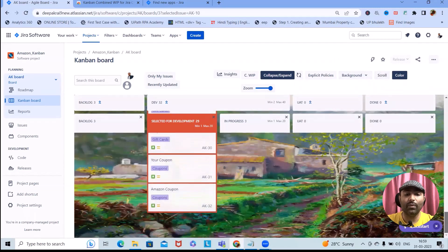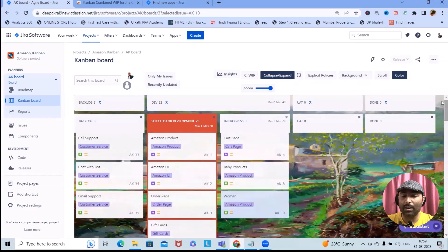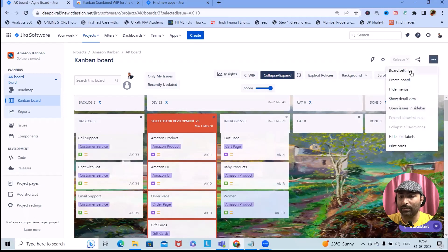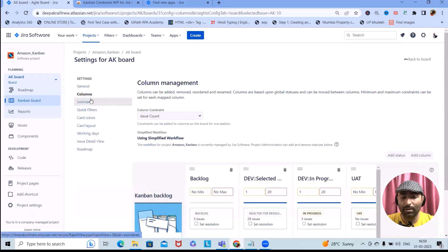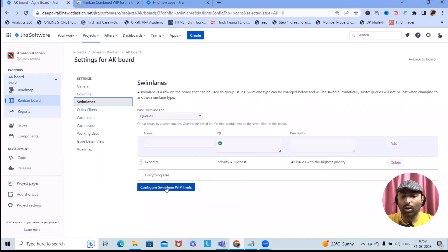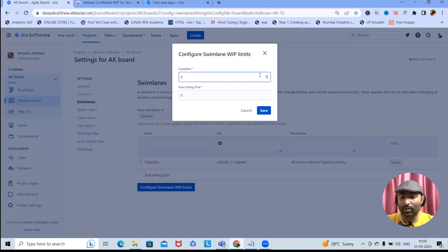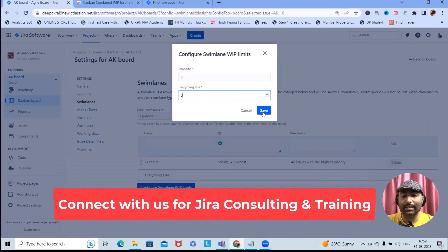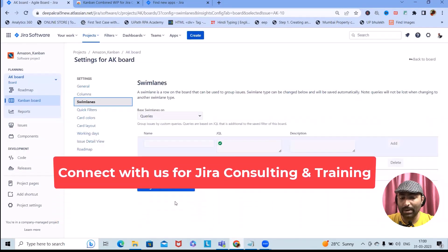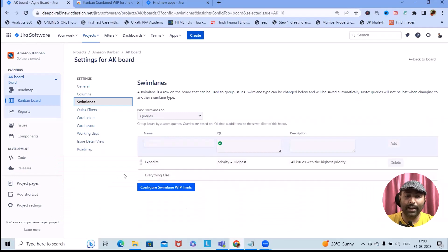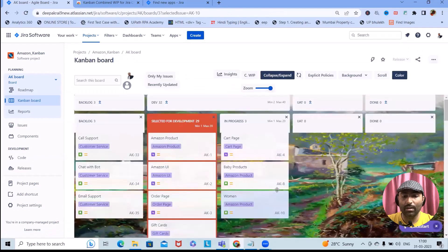This is how we can customize our board and make it interactive for the team. You can add a personal background image within the Kanban board, and also add work-in-progress swim lanes. To configure swim lane WIP limits, navigate to board settings and set values — for example, set 'Expedite' to 5 and everything else included as required. The limit will be applied successfully.